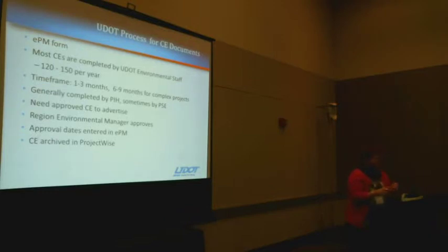If you do need to have surveys done or agency consultation or a public meeting, they could take a lot longer. It just depends on how complex your project is, what kind of resources you need, and where they are. So there's a lot of variety with a CE as to how long it could take.